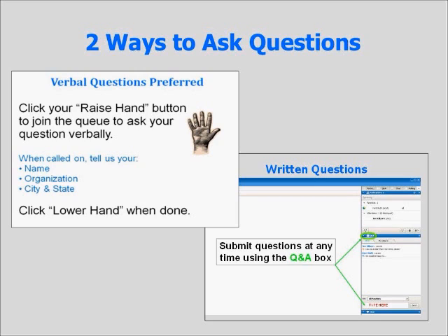It's kind of like one of those Russian dolls. Sometimes you have not only the developer and the developer's costs. Generally speaking, the developer fee is profit and overhead. That's all it should be. Now, people build other things into it, and as long as you know what you're building in, there's nothing necessarily wrong with that. But that's really what it should include. Everything else really is a development cost, and if it's a legitimate cost, it should be in the development budget.